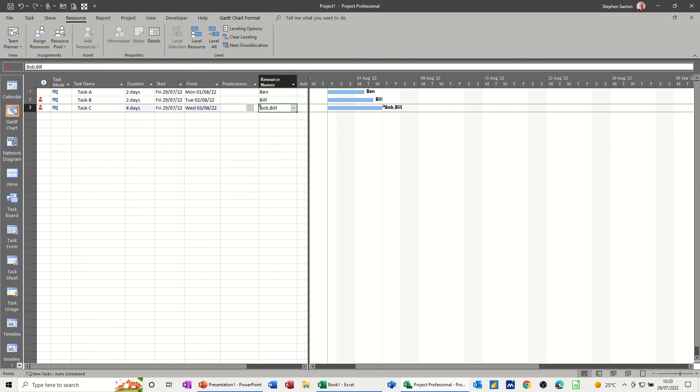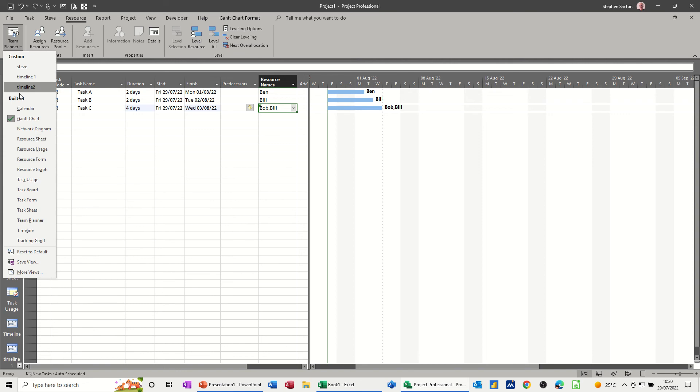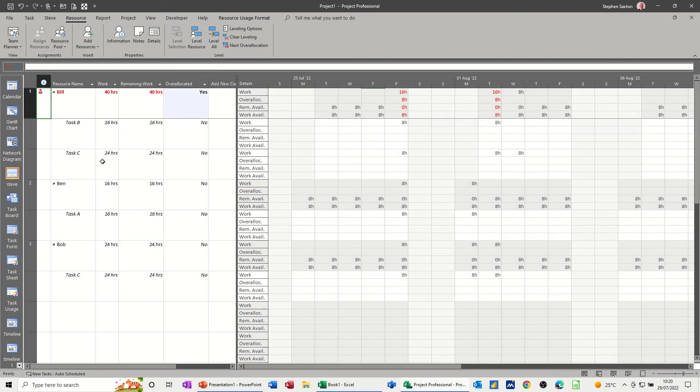So you've got, there you can see. If I go back into Resource Usage, you now get some red indications coming on there. So Bill is red.